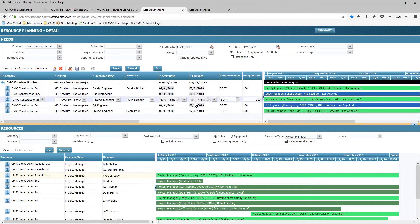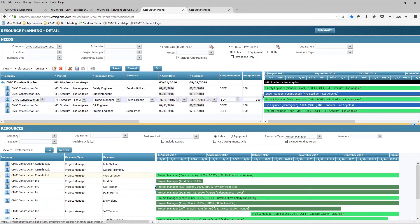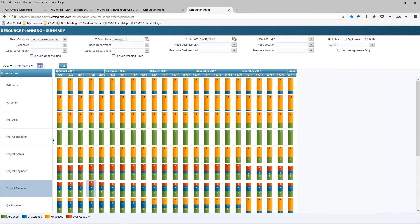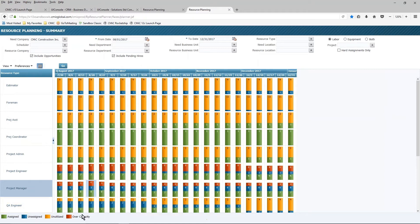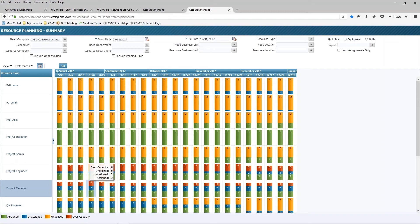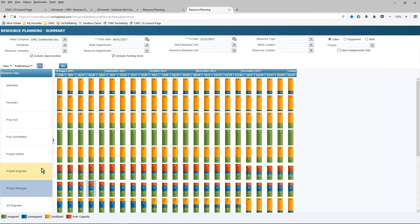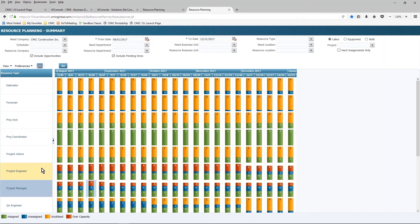Now, I have the option, based on my security, I can toggle from the detail view to the summary view, or maybe I'm starting in the summary view, and I want to drill into the detail view. So when we take a look at the summary perspective, you'll notice there's a legend in the bottom left-hand corner, which explains the color coding that you're seeing here. The green bars that you see represent a need that we have, and we have a resource assigned to that need. The blue bars represent a need, and we don't actually have anybody slotted into that particular requirement.